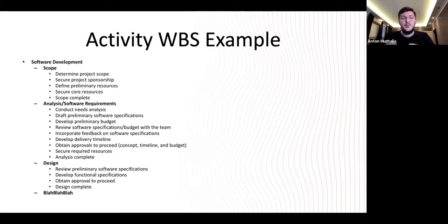Agile is the way of doing the iterations, right? But each iteration can bring some value. And even though we have those iterations, we still have the releases. And not all projects have a release once per sprint, because it's a huge overhead. There are lots of complex solutions that may have 5, 7, 10 sprints or even more to develop one release. And this WBS can be created for the release in the Agile approach.